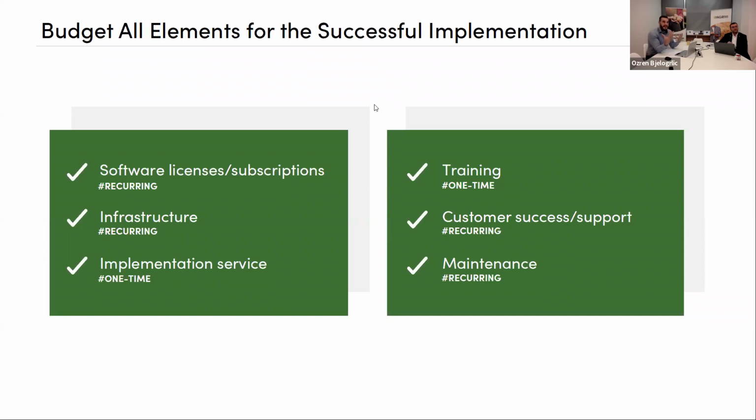Now, at the beginning of the project, the implementation services are most commonly used, right? And they include the data migration, setting up that infrastructure, doing the farm analysis, making sure that the vendors understand your operation in more depth, as well as moving then onto the training that is an extension of the implementation services. As you can see, that's also a one-time fee. Once we import the data and prepare the system, then we go into education and training of the key users or the super users within specific organizations.